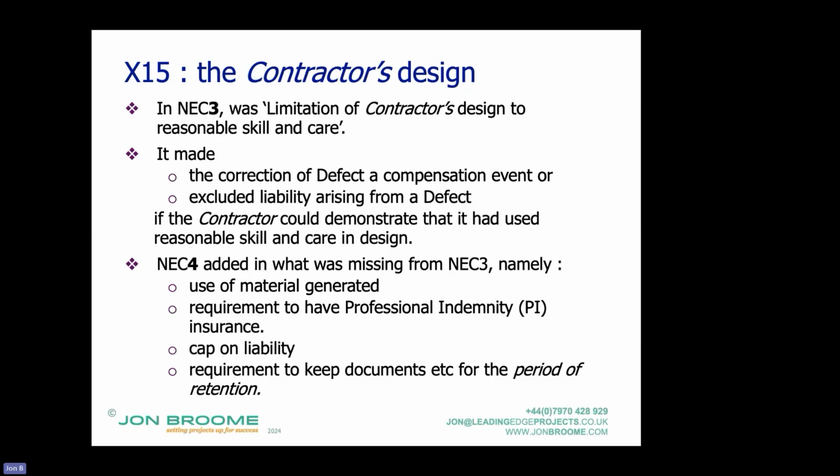And if you're a consultant or a contractor, you want the cap on liability to match the maximum of your professional indemnity, because otherwise, let's say the claim is for 12 million, but your insurance is for 10 million. Well, that extra 2 million is on you. And a requirement to keep documents for the period of retention. So it's in italics and stated in the contract data.